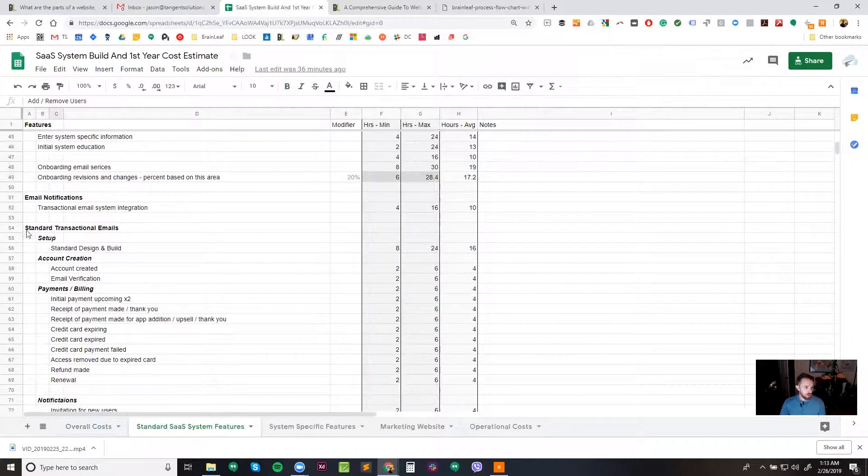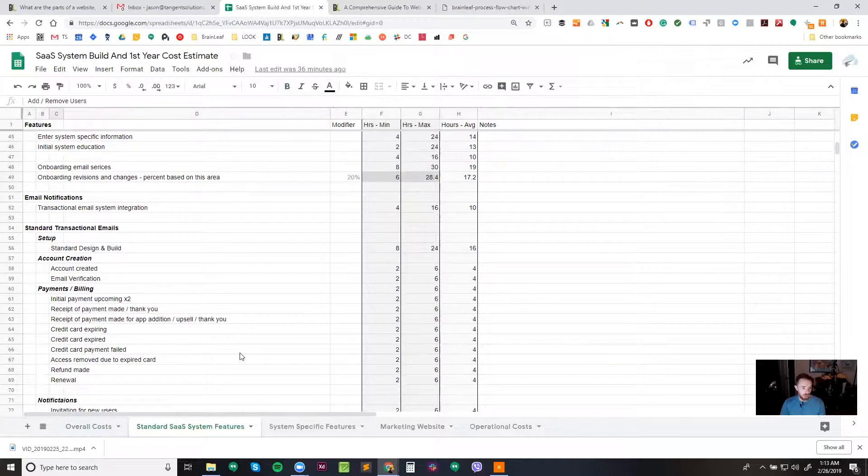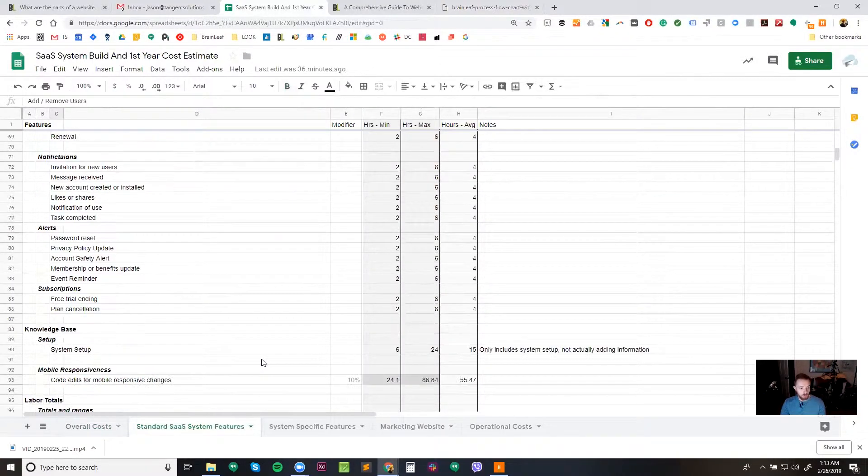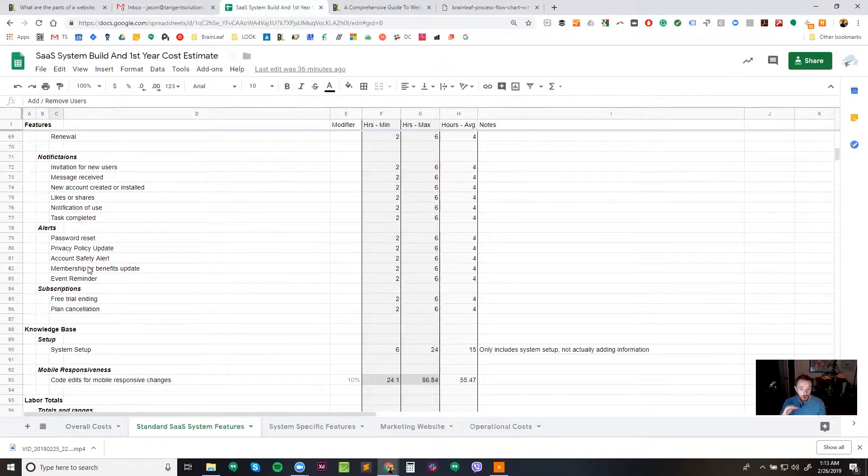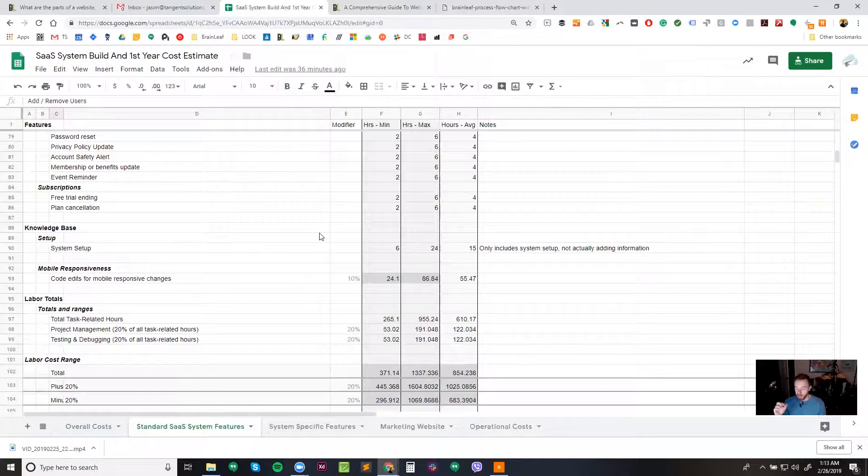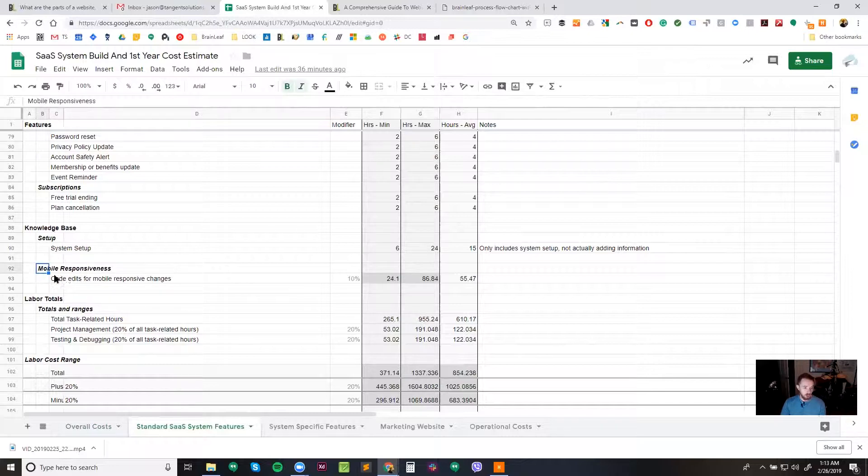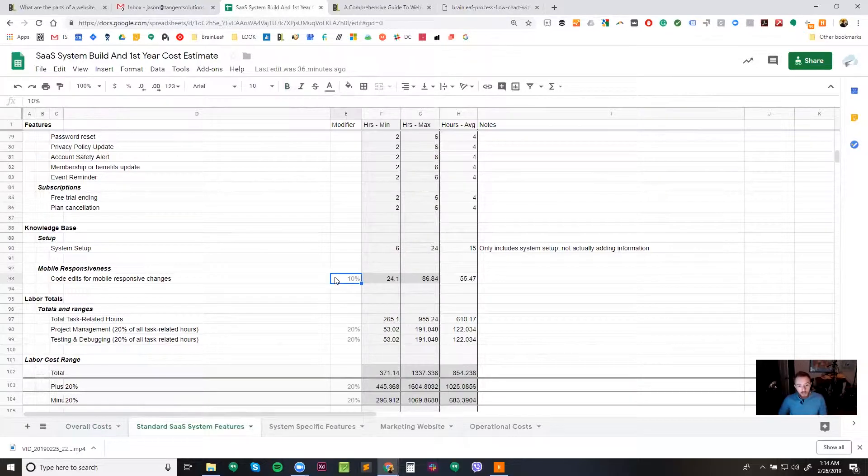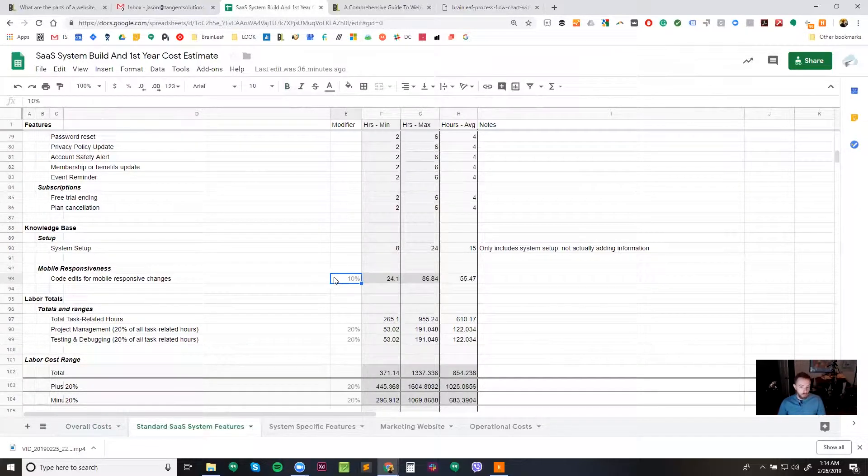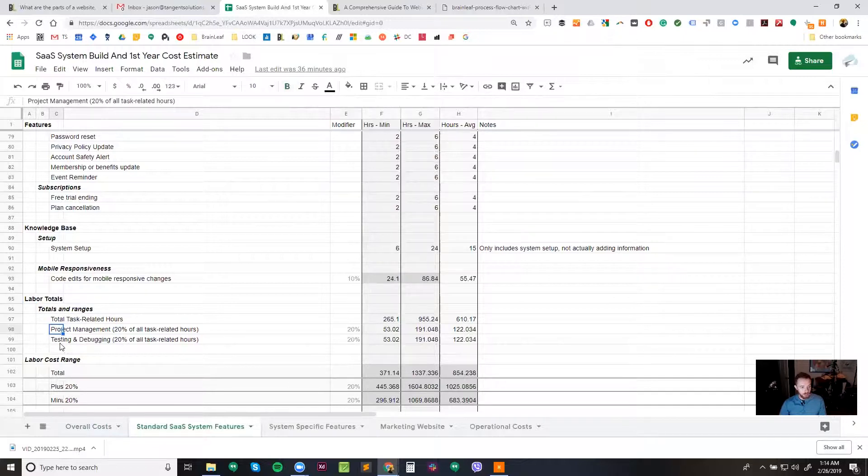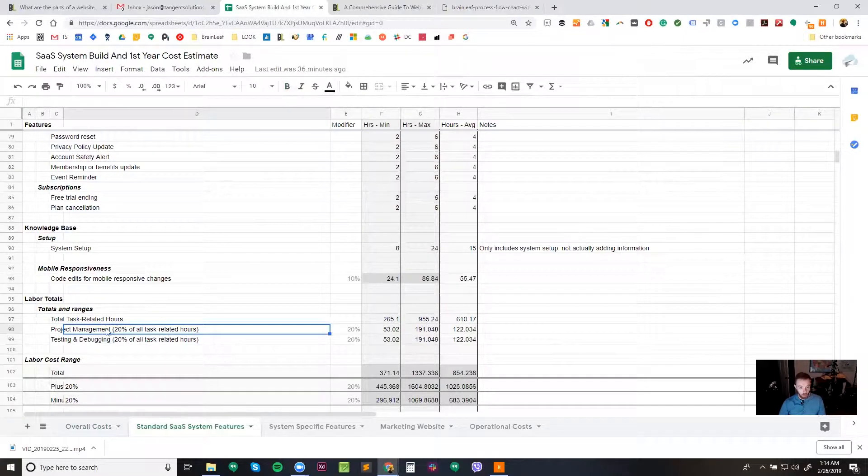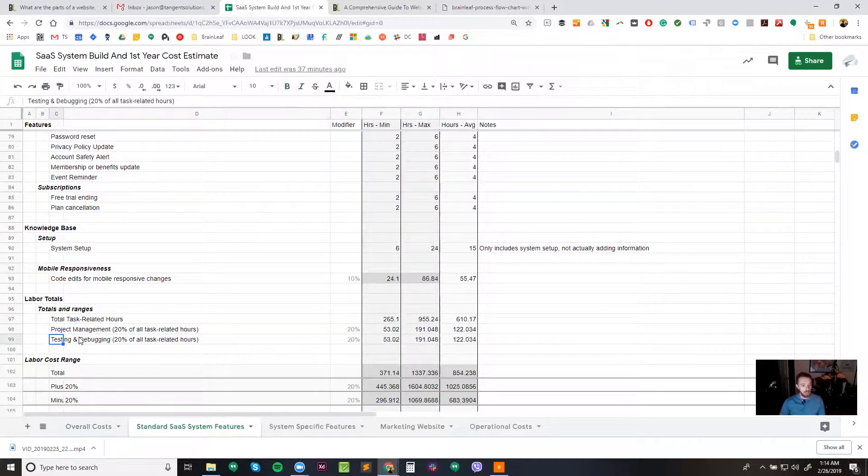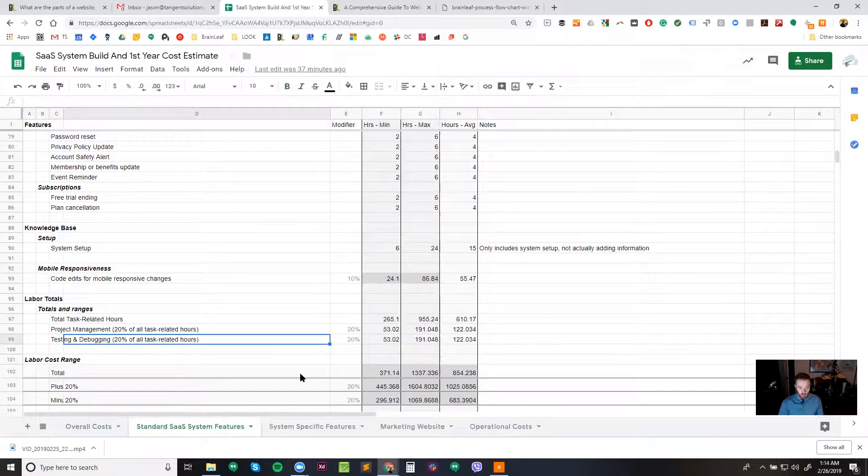So going back to the standard transactional emails, these emails consist of things like the setup, account creation, payments and billing, notifications, alerts, subscriptions, etc. And all the emails that go into that. And then you have other things like a knowledge base. Almost every single SaaS system is going to need some kind of knowledge base setup. And then finally, as you're going through and building this, we like to add in a percentage for just general mobile responsive changes. In this case, we've got 10% on this, but sometimes it can be 20% or more. It also depends on how the system is being built. So all of these things get added up to get our labor totals. And then we added a project management percentage, which is just 20% of all task-related hours. And a testing and debugging or quality assurance item, which is an additional 20% of all task-related items.